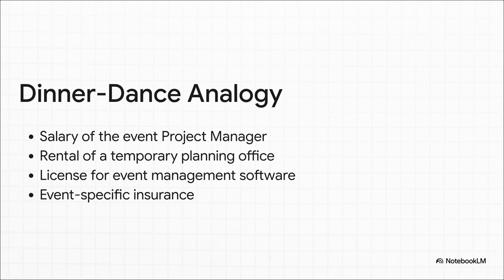So let's jump back to our charity dinner dance. What's the overhead in that scenario? Well, it's your salary as the project manager for the event. It's that temporary office space you rented just for the planning phase. It's the license for the event management software you're using. See? You didn't spend this money on the band or the food, but let's be real, the project would have been impossible without it.